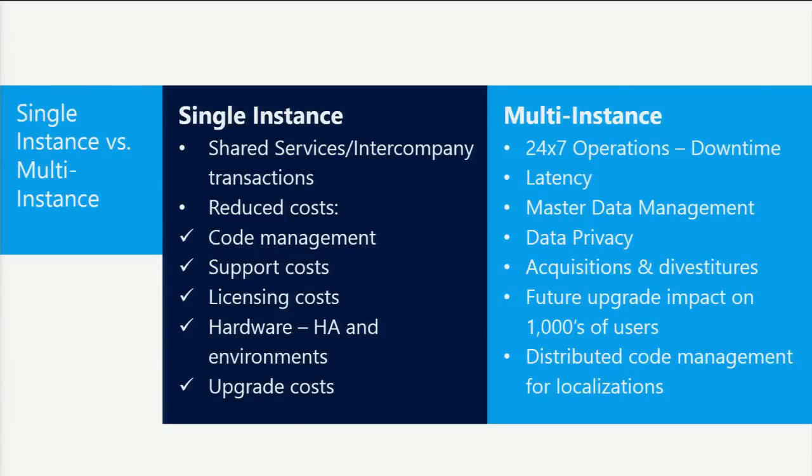Also, we've had some customers that have gone through the global deployment. They now have 10,000 plus users on the system. Well, now when you upgrade over a weekend, 10,000 people are impacted. So those are some other things that you want to think about in advance: do I really want to have a single instance and have that kind of impact on them in the future? We need to be thinking long-term, not just about the short-term needs. So those become strategic decisions that you want to be thinking about early on because, as you guys know, you can't take the pieces and parts and upgrade them easily. Do we have people doing it? Yes, but it's a lot more effort to do that staged upgrade after everybody's in a single instance. It becomes more of a migration effort, okay?